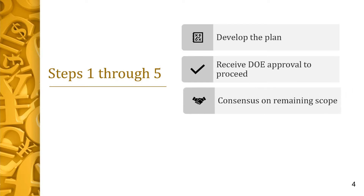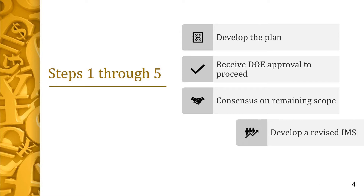Step 3 is where the parties reach consensus on the scope of the remaining effort as supported by the ground rules and assumptions for the comprehensive estimate to complete. This validation should not result in a scope change to the contract. The level of scope review should be done at the work package and planning package level. Any changes to the contract scope identified during validation require a bilateral modification by the contracting officer and should be tracked separately from the OTB process for contract budget-base reconciliation purposes.